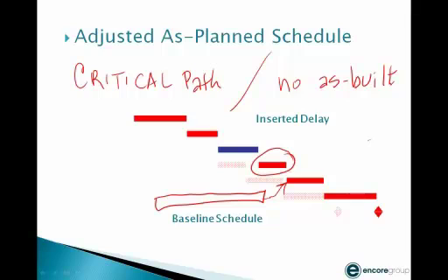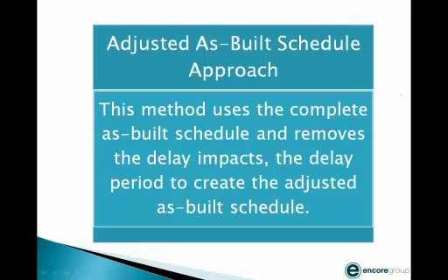Now, if you're at the beginning of the job, then this analysis is about all you have, because that's the only schedule is the baseline. And that's why it's so important to begin your updates as early as possible, so you're not forced to go back to a schedule that becomes out of date. Because it has no as-built information, it doesn't stay accurate very long. So that's the upside and downside of that.